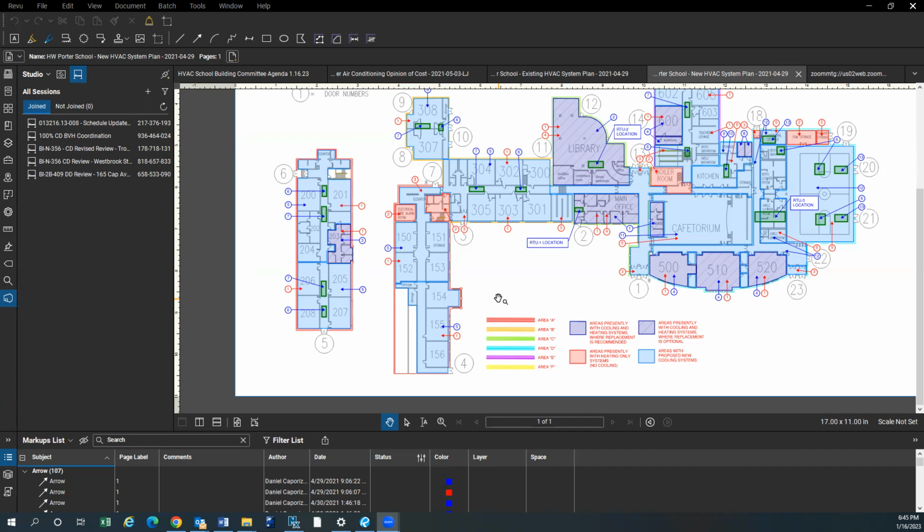A project like this can be done one of two ways. You can do what they call a traditional design, bid, build scenario, or you could go design-build with a contractor, meaning take the engineer out altogether, but you've got to be comfortable with that as a group. You'd get a proposal out and give it to three or four contractors. You'd be lucky to probably get two bids at the moment, the way things are.